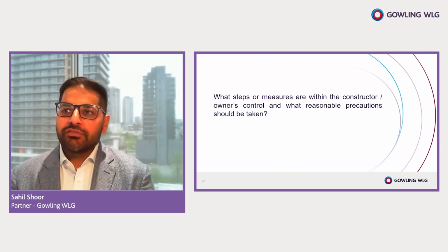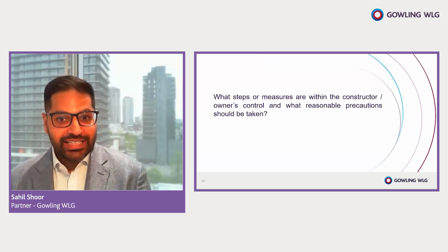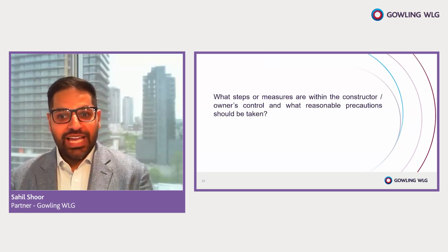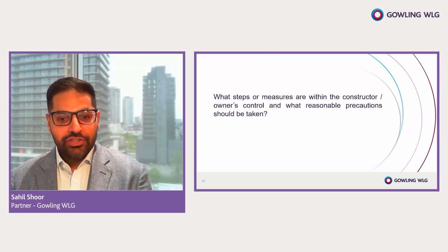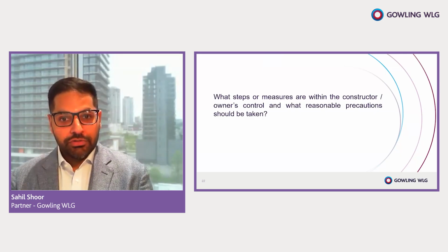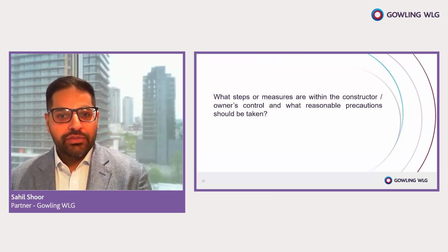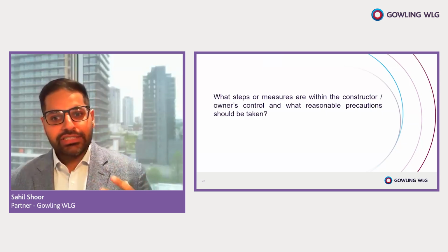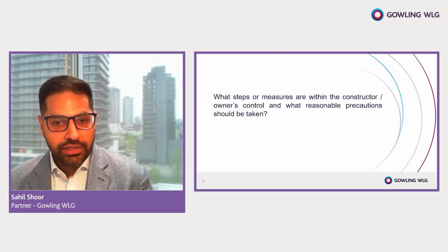One of the things that you have to be very careful and cautious about is, if you're delegating, make sure you're delegating. And number two, if the delegation is taking place and you have the contract model surrounding the delegation, you still ought to have your own safety management plan that builds into the management safety plan that you would have received from the contractor, and see how it is actually going to work out in terms of complying with these obligations.